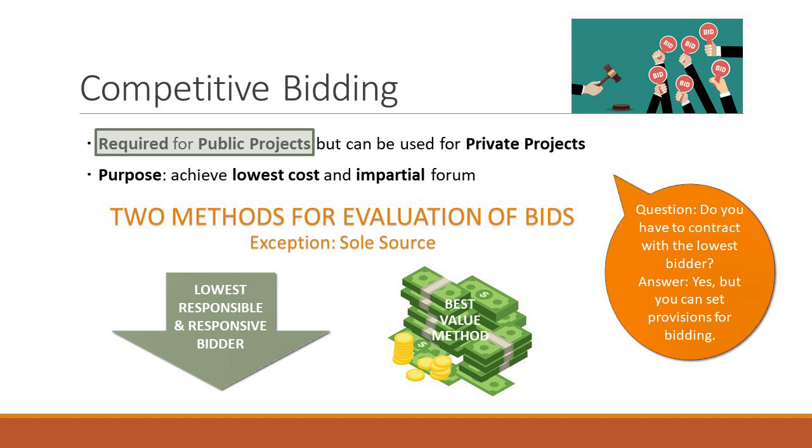What do we do? And so we looked at the rules, we looked at the statute, and based on the RFP, the way it was written, I told them, you guys can throw this entire bid out. It's going to stall everything, because now we've got to start all over. It's going to put back your project by about 5 or 6 months. But you can throw it out. And then what we did is we redesigned the RFP to require more transparency. There were more boxes for them to check to be a responsive bidder.